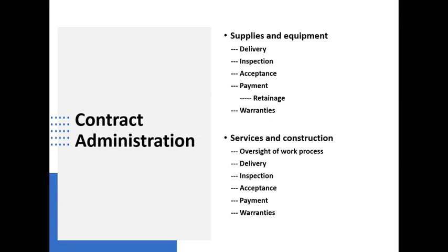Now, keeping up with all that you've done in purchasing involves generating procurement records. And Section 203.18I has an odd way of talking about this. It says that you must keep records that relate to the significant history of the procurement. And they're really talking about an audit trail from the beginning of the purchase all the way through acceptance and payment. At a minimum, that history of the procurement involves at least the four elements that you see on slide 20.